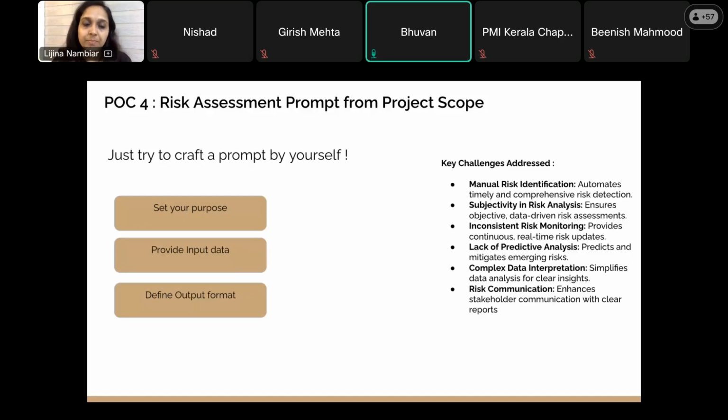Then the owner of the risk and the date by which the risk should be addressed. And for example, the RPN, the risk priority number, based on two columns, one for probability, one for impact, and the last one for RPN. And then the last column based on this priority, 1, 2, 3, 4, 5.